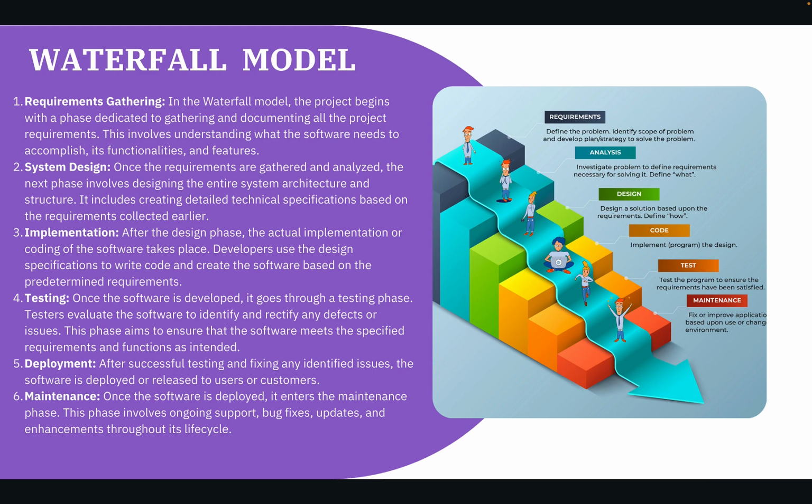Fourth, long delivery time with the waterfall model. Each phase must be completed before moving to the next phase, which could result in a longer development cycle. In rapidly evolving industries like smartphones, this can be a significant disadvantage, as time to market is crucial for success. Testing at the end may be another drawback. Testing happens towards the end of the project when most of the development work is completed. If major issues or defects are found during testing, rectifying them can be time consuming and expensive, potentially causing delays in the product release.